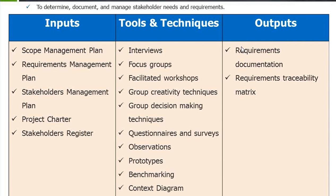The tools and techniques specified here were interviews, focus groups, facilitated workshops, group creativity techniques, group decision-making techniques, questionnaires and surveys, observations, prototypes, benchmarking, context diagram, and document analysis.